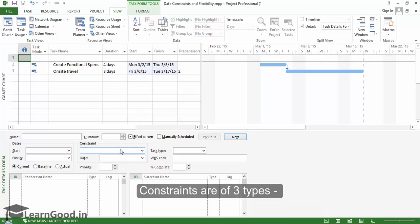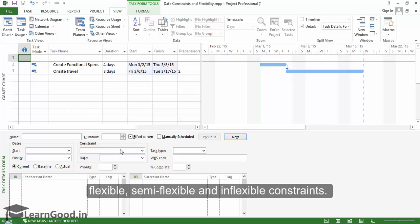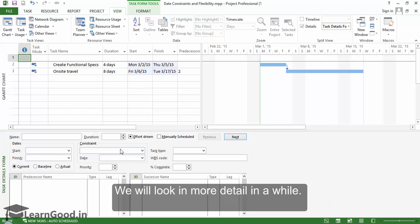Constraints are of three types: flexible, semi-flexible, and inflexible constraints. We will look at those in more detail in a while.